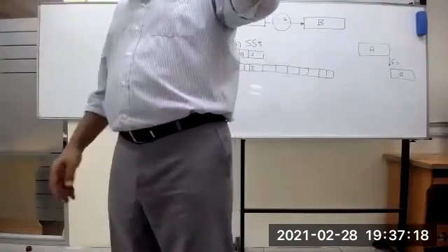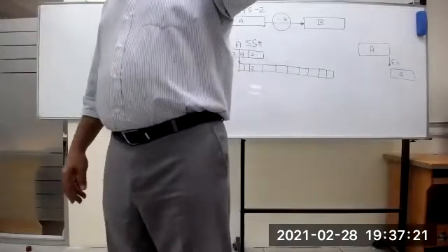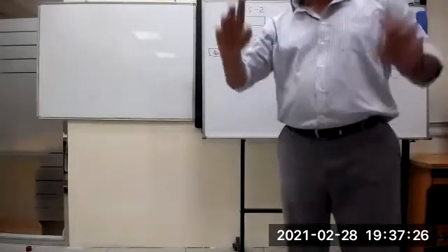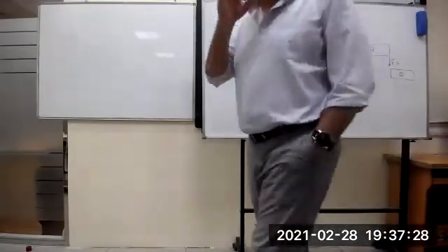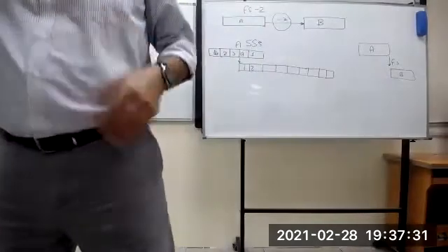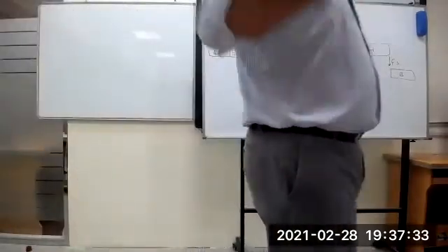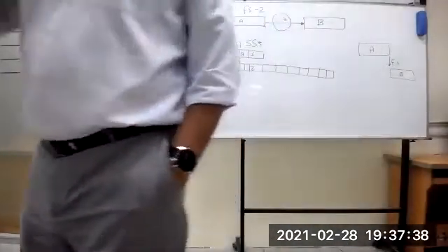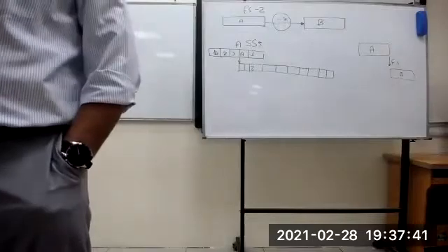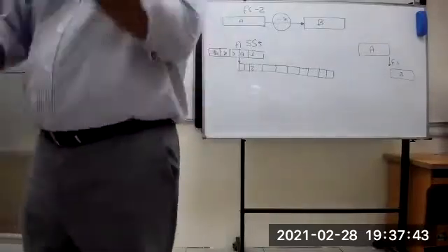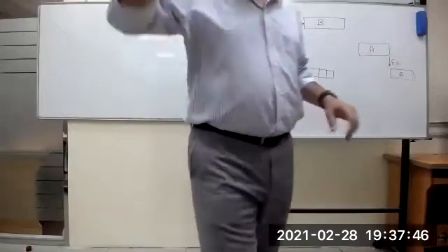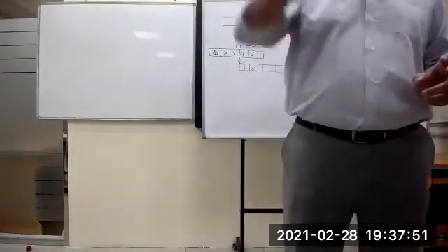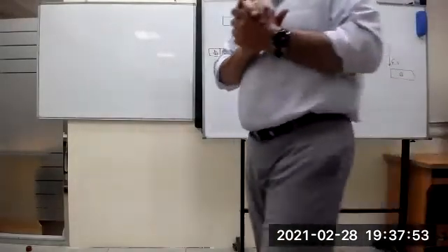Not finished, not started. But you cannot change the relation. This is a must: dependencies. We call it column and slab. You cannot cast the slab before the column. So it's a must. When you say finish to start, we call it dependency. Finish, then you have to start. Not 'at least', which is playing with you. Look for has to, have to, must.